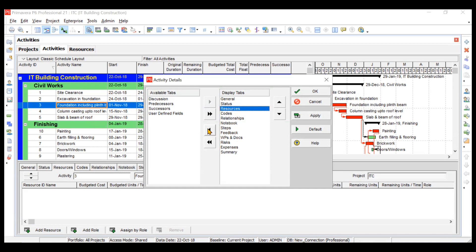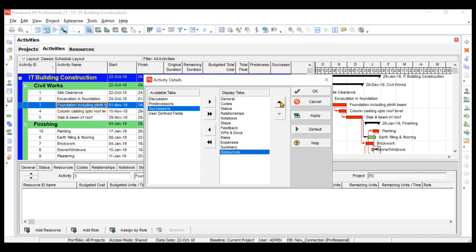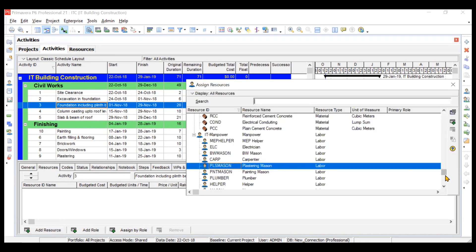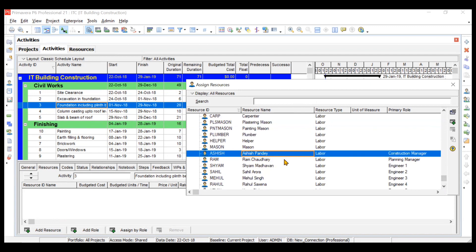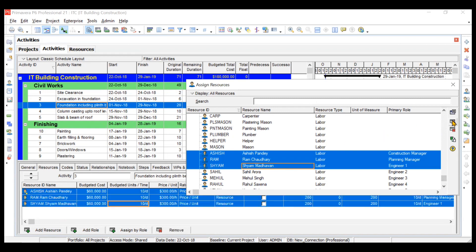You need to find the resources column and move it into position using the arrow, then click OK. Now we have our resources column. You can click on 'add resource' to add any kind of resource for that particular activity. First, we will add one planning manager, one construction manager, and engineer number one. You can hold the control key on the keyboard to select multiple options. This is how we can assign these three resources.